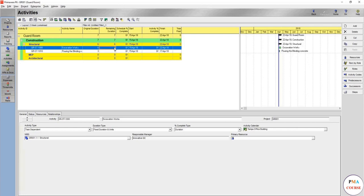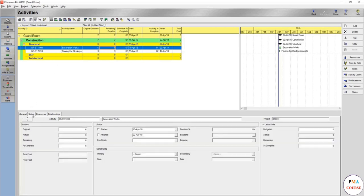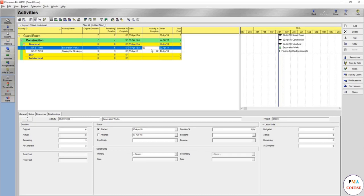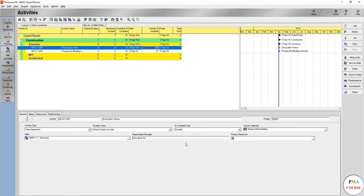We can widen from here. In such case, if we put this one, let's say 50 percent. When you update, you are going to update from the status column using, let's assume started, then we will make the remaining duration three. It automatically changes to 50 percent. That's duration.